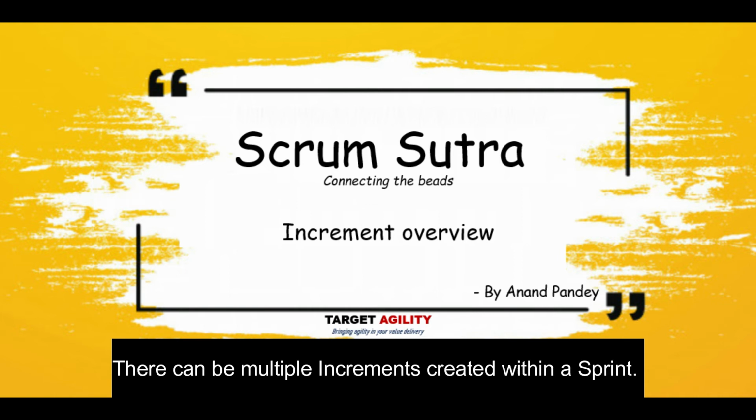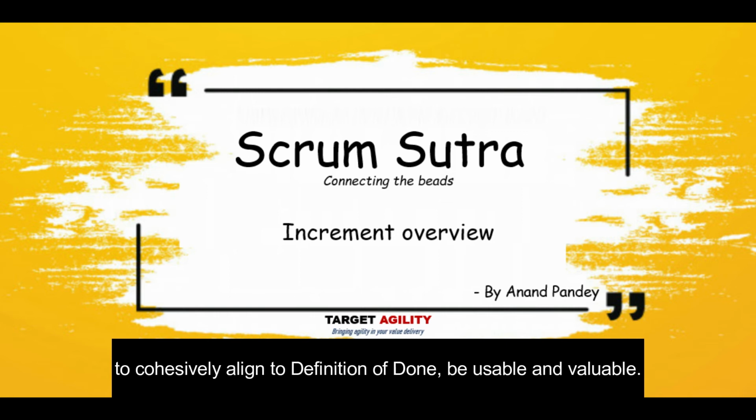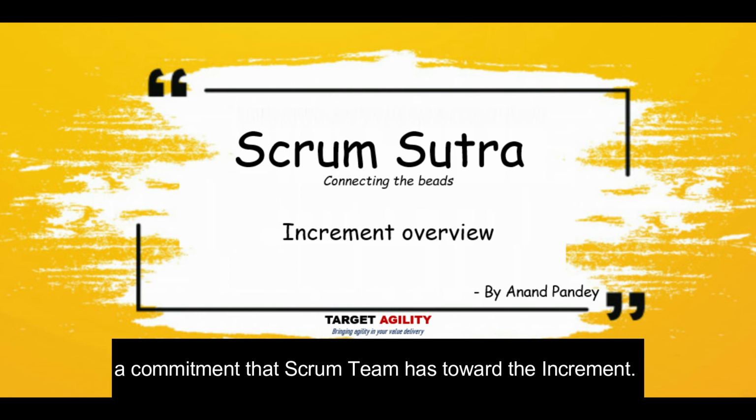There can be multiple increments created within a sprint. Each increment is built on top of all prior increments and needs to cohesively align to definition of done, be usable and valuable. Talking of definition of done, the definition of done is a commitment that the Scrum team has toward